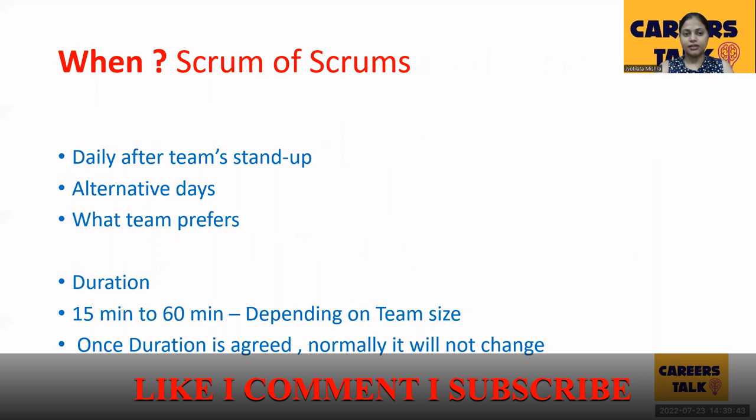When you can have this, again, depends on what the team prefers. But if I have to say, you all can connect after your daily stand up. Like once the daily stand up is done for, say, Tuesday and Thursday, you can connect after that. You can connect on alternate days if you're running a really complex program and it requires a lot of coordination and collaboration. And duration, again, it could vary from 15 to 16 minutes, depending upon the team size and the complexity of the program on which these Scrum teams are working.